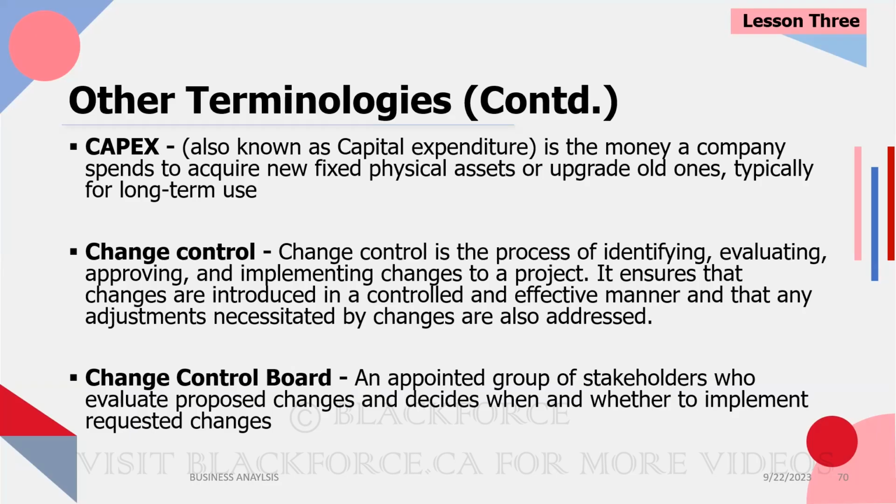The change control board is a group of people, appointed by stakeholders, who decide on change requests, approve or deny, right? You as the BA, please do not approve a change. You do not have the power or the authority to. And do not overpromise and end up under delivering, right? Don't promise them, oh, absolutely, we'll make that change.